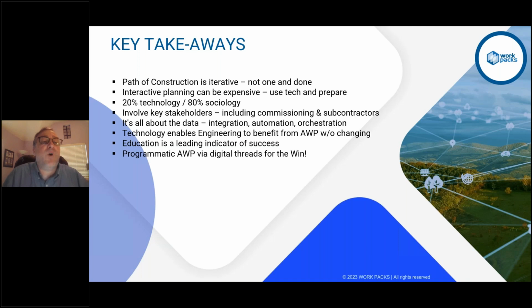And the key here is to involve all the right stakeholders, get the right people in the room and communicating, particularly bring in commissioning. Make sure there's alignment between the commissioning and the overall construction schedule. Completions and the commissioning often get disconnected. Frankly, a lot of times the civil side comes up so quickly that we end up pre-mobilizing to the field too soon, and civil work ends up being a bit disconnected from the overall construction effort, right? So the civil folks need to be definitely a part of it, because if you get messed up coming out of the ground, you don't recover easily, right?